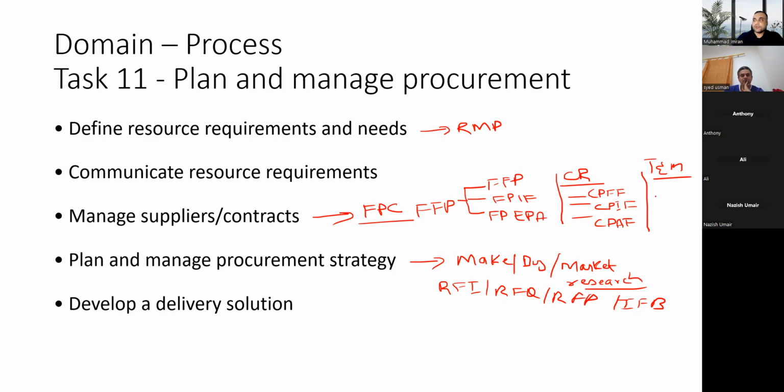Then we have time and material contract where the unit rate is defined. Or in agile we can have main contracts with the help of a master service agreement. And for each iteration or feature, we can have appendixes or addendums related to the requirement. So we will have our master service agreement. So based upon those contracts, we will establish the relationships between the contracts and ultimately we will deliver the solutions accordingly.